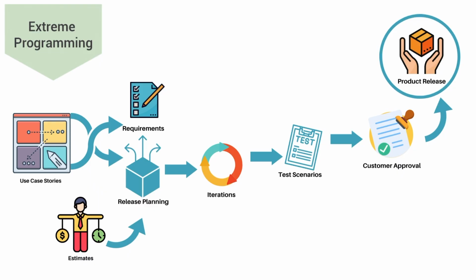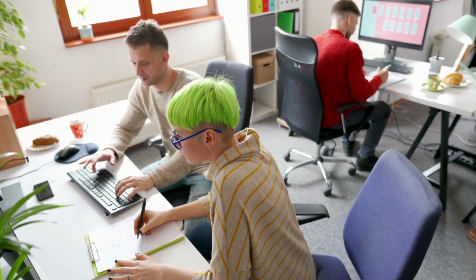That's a method primarily focused on software projects, but it can also be used for other kinds of product development projects. It essentially pushes the boundaries of software development best practices. It's driven by iteration basis. The development team estimates, plans, delivers, and manages high priority user stories. We talked about that earlier. This method is significant for customer involvement, rapid loops of prioritization, and teamwork. Features of this are paired programming, continuous integration, unit testing, code review, and more.